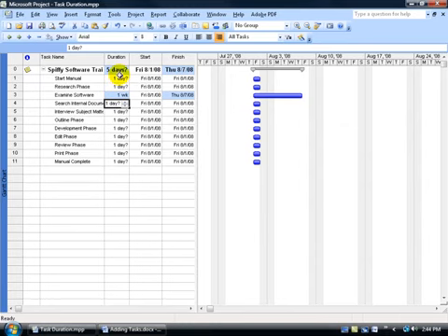It says 5 days it's going to take to complete the project because every other task starts on the first day and will be completed in 1 day, where this task right here is going to take an additional 4 days. And you can see up in the Gantt chart it's got its starter marker here for the project summary, saying basically every task that you see lined up here starts on the same day, but there's only one task where the ending marker ends on August the 7th, and you can see it right there,